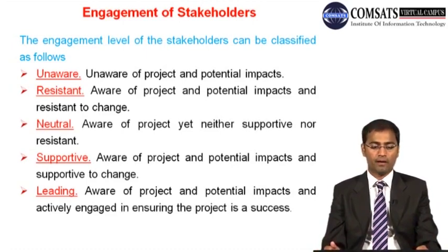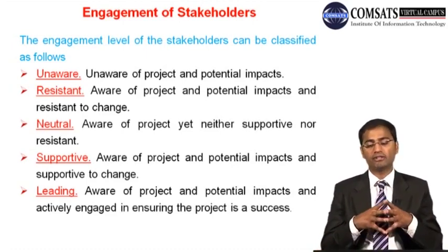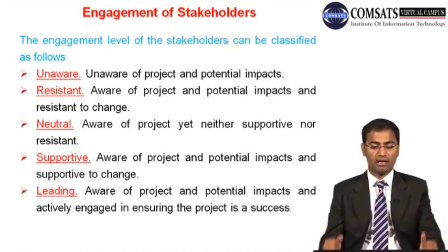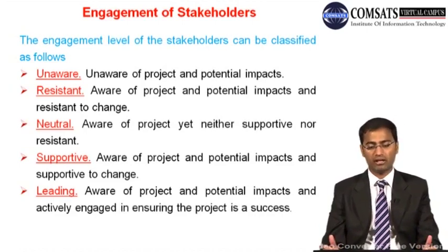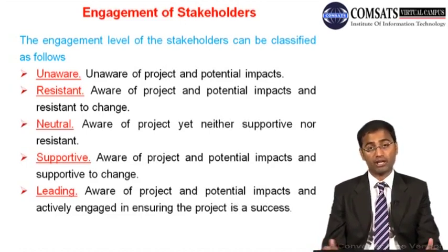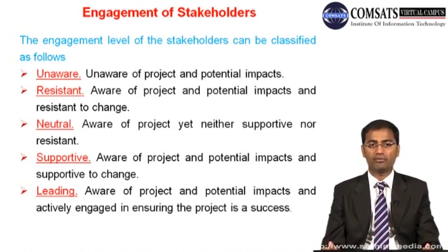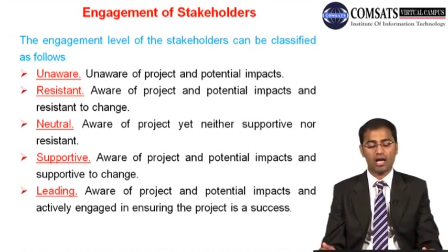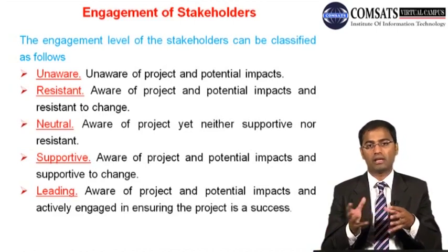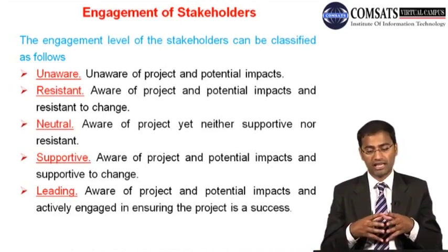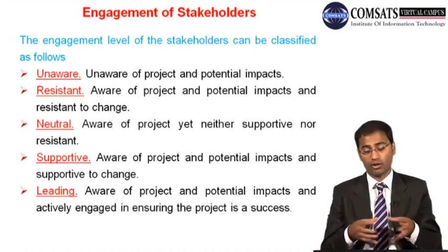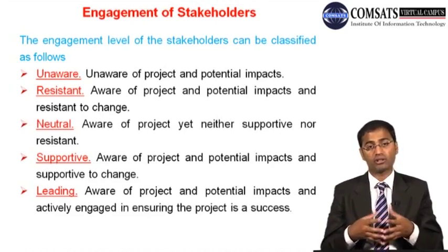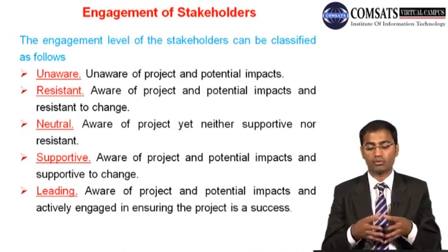After going through identification, understanding the context, carrying out analysis, and reviewing grids like the power-impact and power-influence grids, we come to the engagement level of stakeholders. Engagement levels can be classified as: unaware — stakeholders unaware of the project and potential impacts; resistance — aware of the project and potential impacts but resistant to change; neutral — aware of the project yet neither supportive nor resistant; supportive — aware of the project and potential impacts and supportive to the change; and leading — aware of the project and actively engaged in ensuring the project is a success.